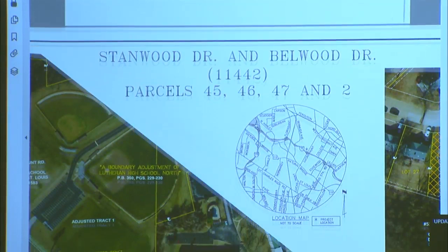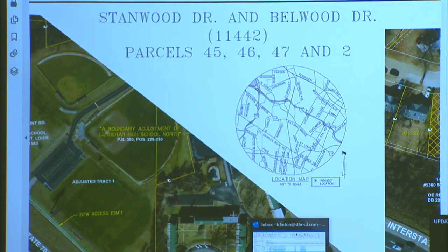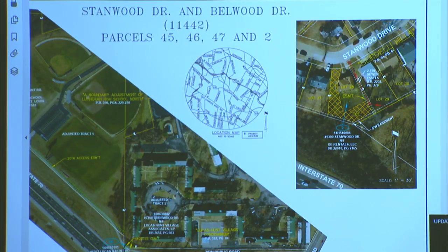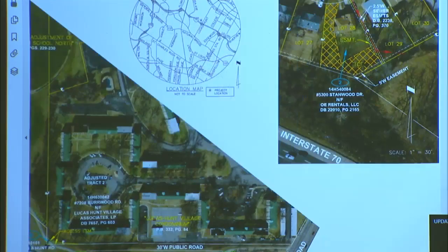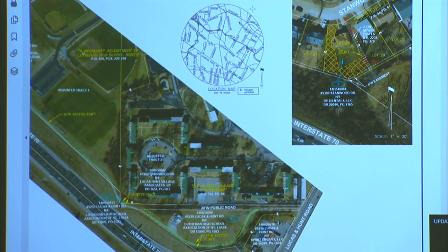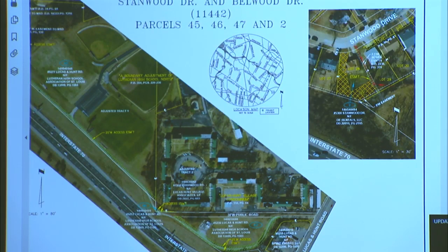There were originally 9 easements planned for the project. We've acquired 4. There's 1 remaining with the county, which we're real close to having signed, which leaves 4. We continue to negotiate with the property owners, but in order to keep the project on schedule, we're proceeding with condemnation. Along with this, you should have a map that shows the location of the easements.